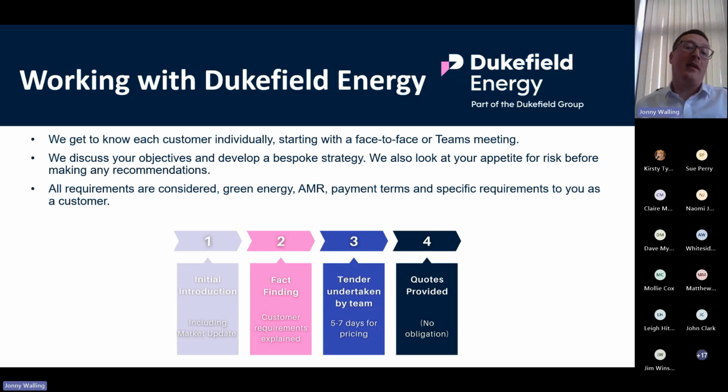The initial introduction is, as I say, understanding your requirements, and a market update as to where we're at. Stage 2 is, hopefully if we get that far, you sending us information about the meters. We'll then naturally have some questions about anything weird and wonderful within there. Once we've figured out everything that we need in order to create the tender, we send that off to our suppliers. There's normally around a 5 to 7 working day turnaround on that. Again, the more notice we can give to suppliers, the more we'll likely bid on the business, if you see what I mean. And then from there on in, we send the quotes over to you as a like-for-like comparison against your current costs.